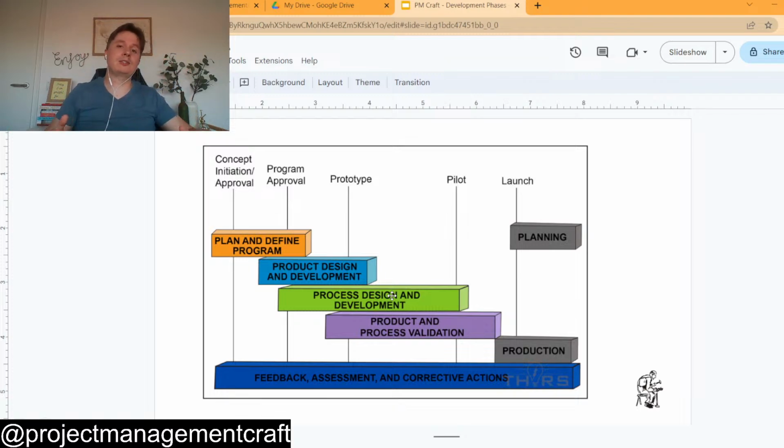And if you understand those steps, you start to draft out or see clearly what would be your critical path. And of course, depending on the type of product, you are going to have different bills of materials. And these different types of materials will have different lead times, which is going to influence your critical path.